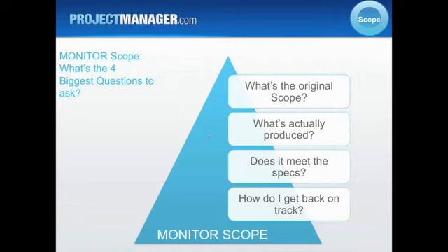So here's where we begin looking at the deliverables and what's being produced, and is it in scope. So this is where terms like gold plating come in, where things begin being produced and you look at things and you're like, where did this come from? And people are so excited that they've produced this as a deliverable, but it's not actually part of the agreed upon scope. So that's one of the gotchas where we end up having produced something that the customer has to pay for that no one agreed to, so it makes people unhappy.